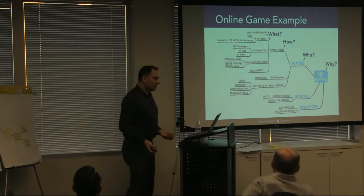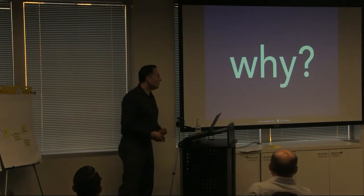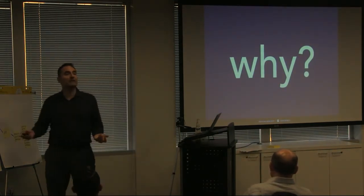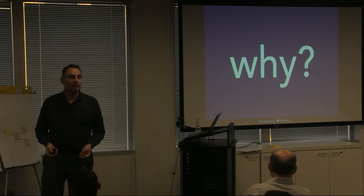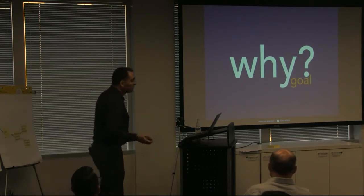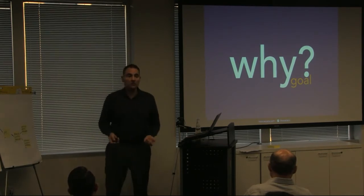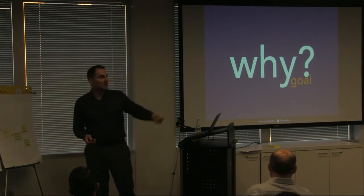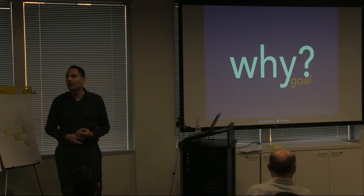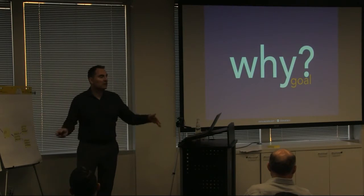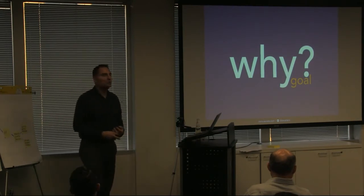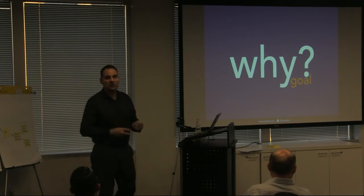At the center of it all is the WHY — why are we doing this, why do we invest money and time? That is our goal. It works really well for milestone goals. Don't try to capture a five-year master plan — aim for a three-to-six-month goal, because you want it short enough that you can react and it's feasible and realistic, but big enough that there's some strategic value to it.